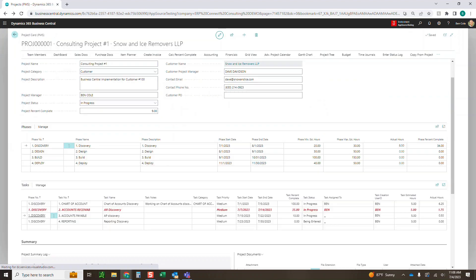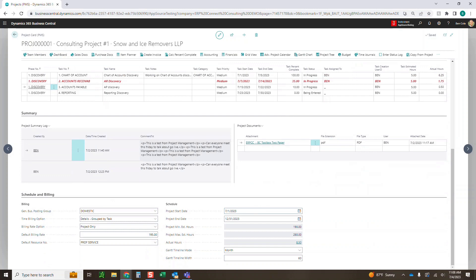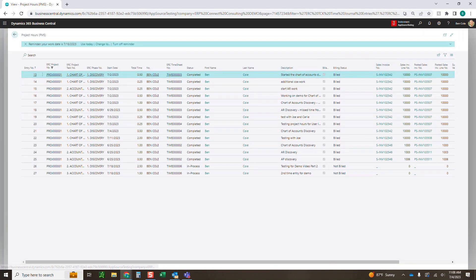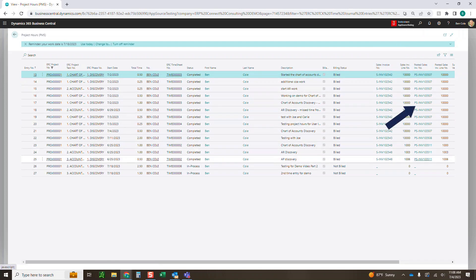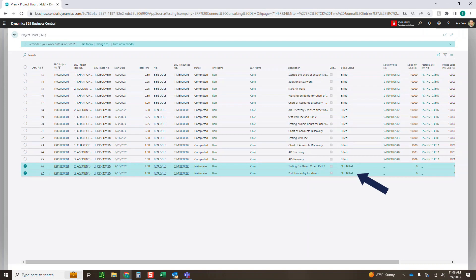If I look at the actual hours on this project, you'll notice that everything so far has been put on an invoice and billed. You can see the posted sales invoice number out here, which you can drill down into. And you'll see these two new time entries that have not been billed yet. In order to bill these, I've got a setup that requires approval. I'll go do that, and then we can see how it flows through.